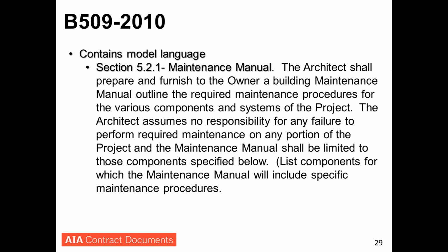What our research indicated is it's the simple maintenance stuff left unattended that results in these big claims. It starts out as a little thing, but the homeowners associations don't want to assess their homeowners. They just let these things go. And again, you're talking in many cases in these condominium buildings about very large, very complex, modern buildings, and homeowners associations are run by a group of people who bought a 1,000-square-foot condominium. They don't know what it takes to maintain a modern building, with a rain screen and a single ply roof. These are all things that are alien to their thinking. And so making sure that a maintenance manual is created and that it is a part of what the homeowners association has to incorporate into its thinking is a very important protection.